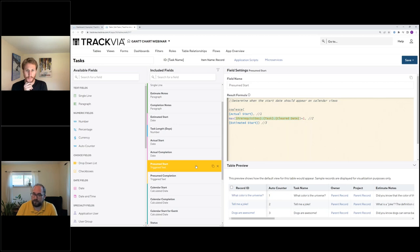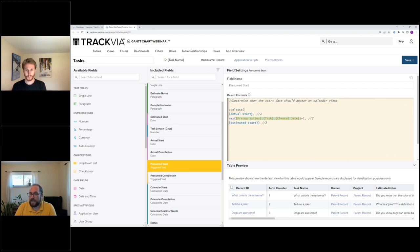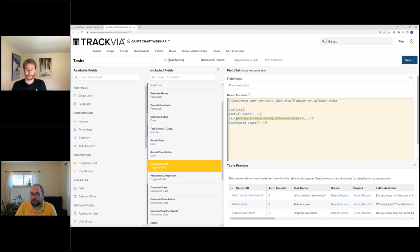The key field is the 'presumed start date.' This is where we figure out when we think the start date will actually be, based on everything else. We use the COALESCE function, which fills in the first non-null value from a list. We start with the actual start date — if it's been entered, use that. If not, fall back to finding the latest completion date among all prerequisites using the MAX function, reaching down into the prerequisites table. If there are no prerequisites, it falls back to the estimated start date.